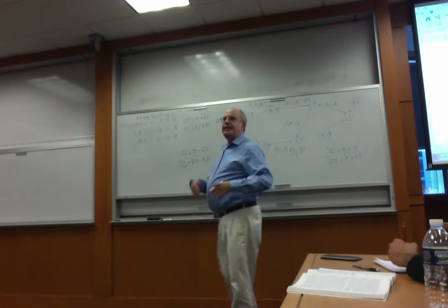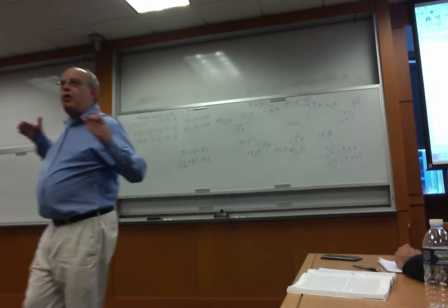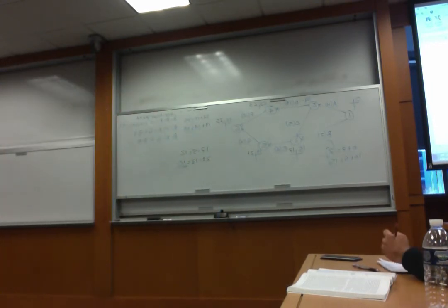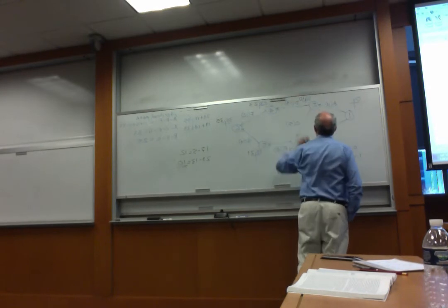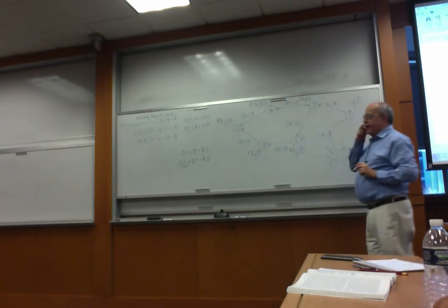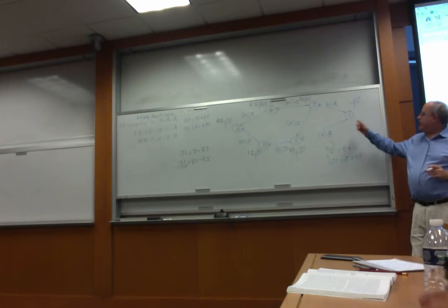Again, everything is done in reverse. When we had more than one option going forward, we chose the larger value. Now when we have more than one option going back, what do we choose? The smaller value. So the value that we're going to assign over here is 10. Okay. After 2, what is the next point going back?